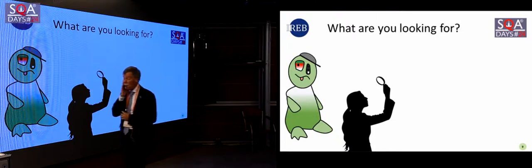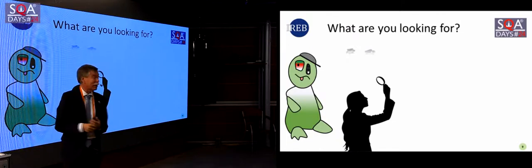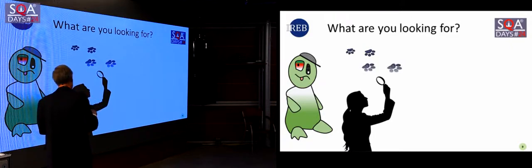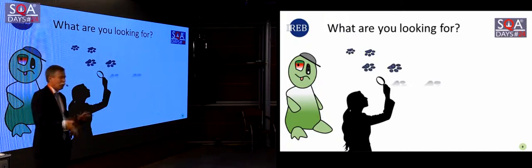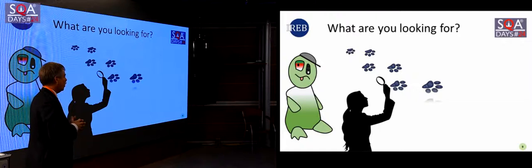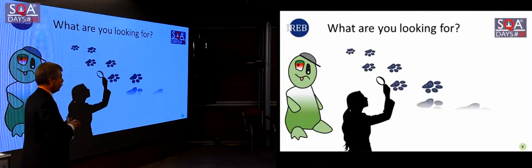Well, it's not in. Without an audit trail you can't go into production, of course, because then we can't check anything. Well, they were kind people, so we got permission to go into production if we promised to add an audit trail in the first 3 months of production.